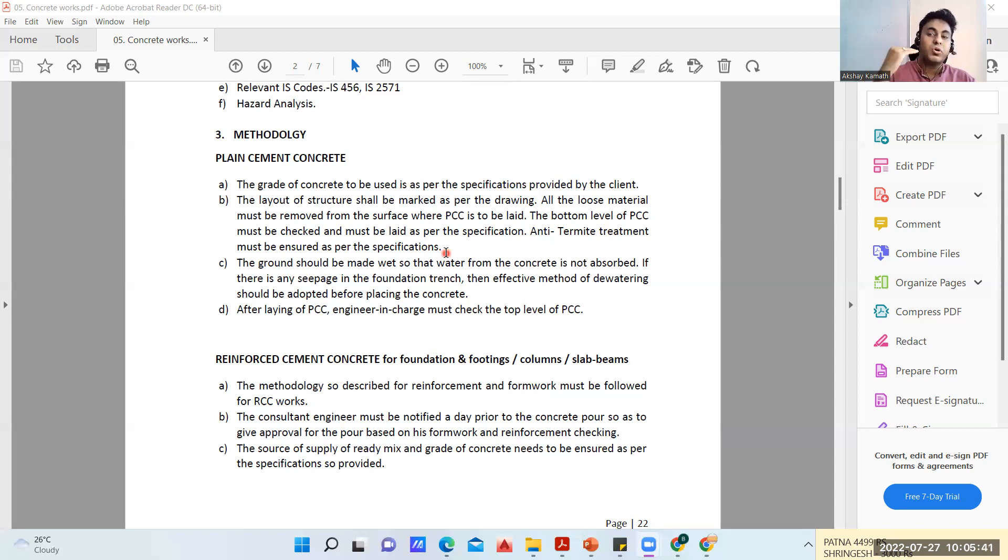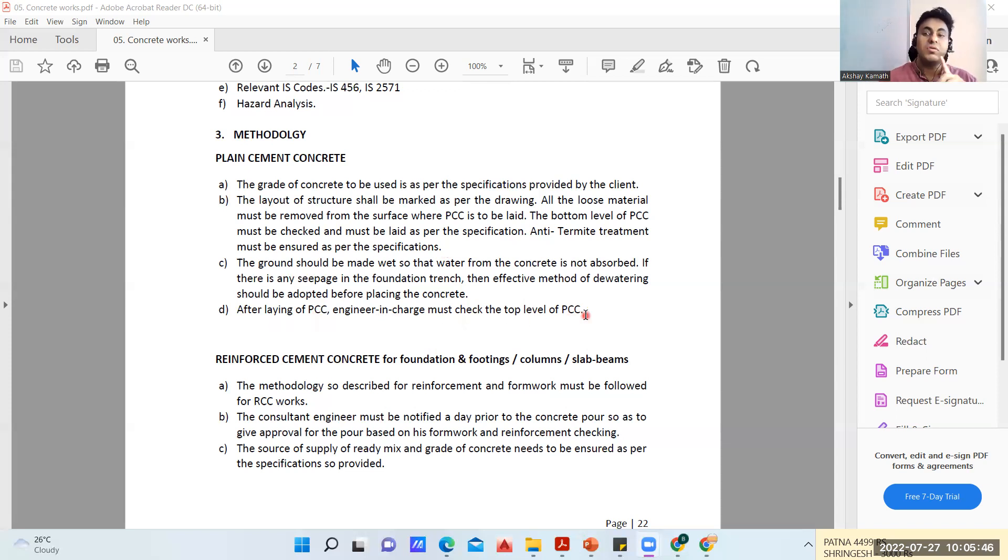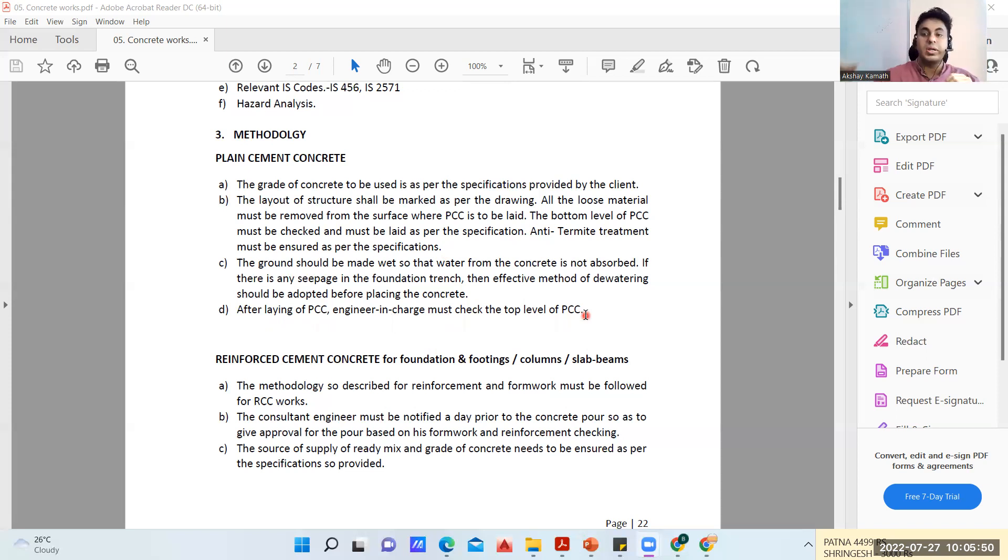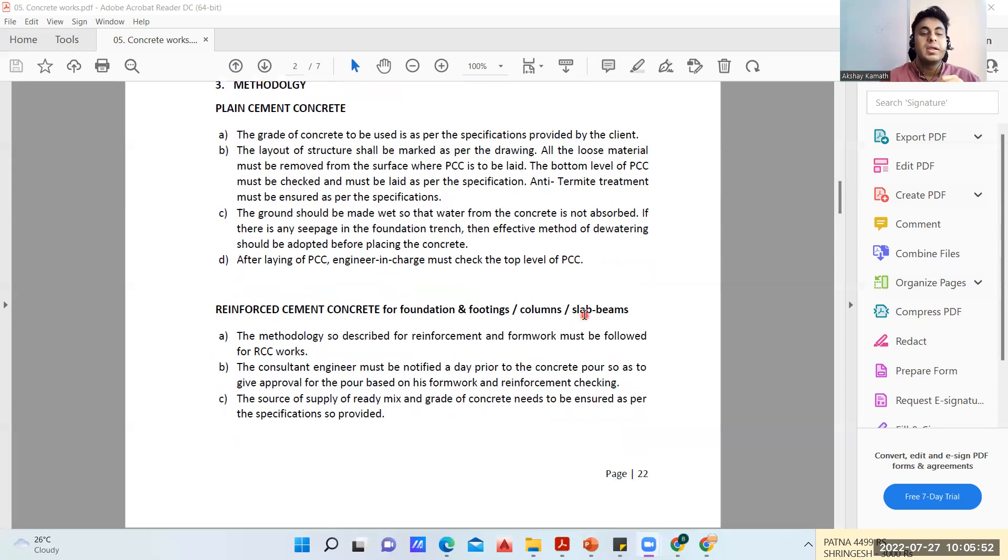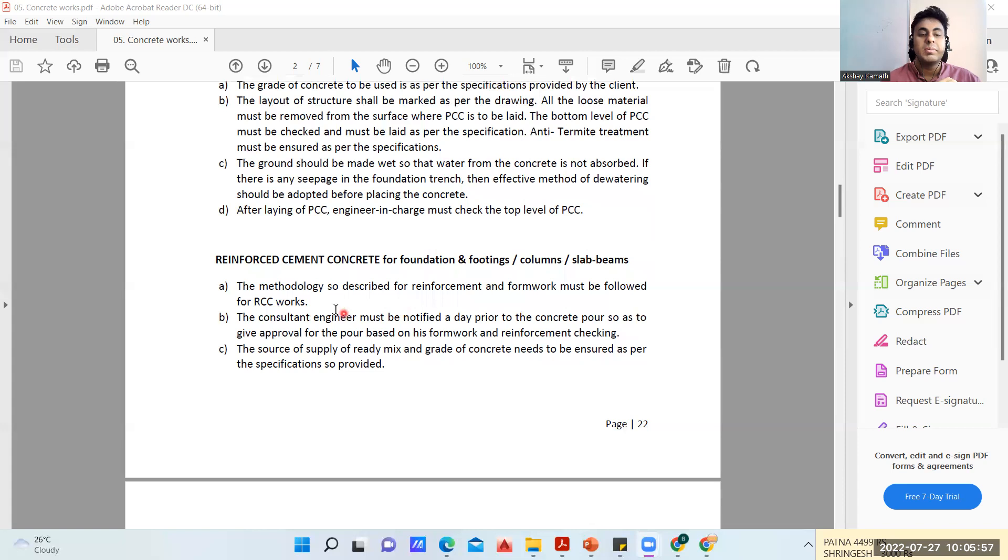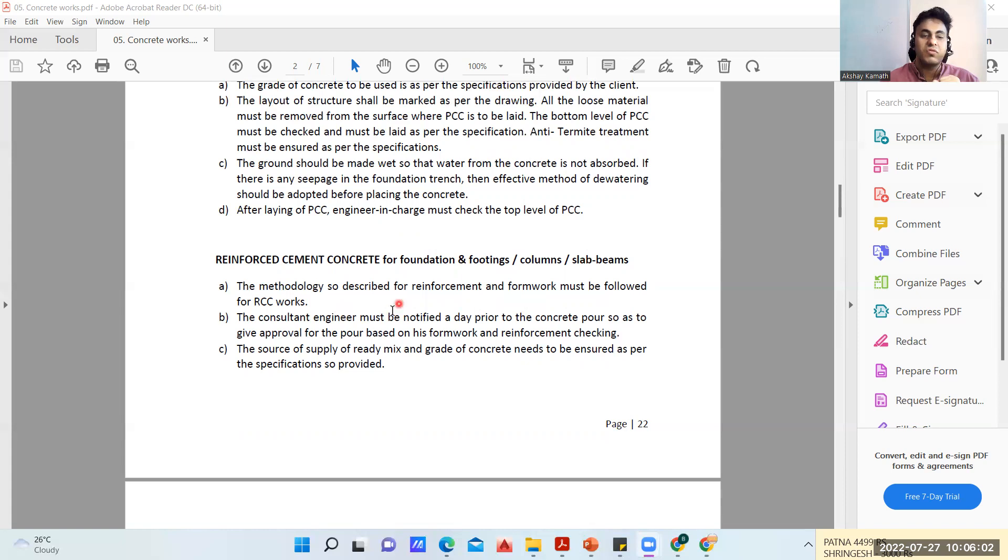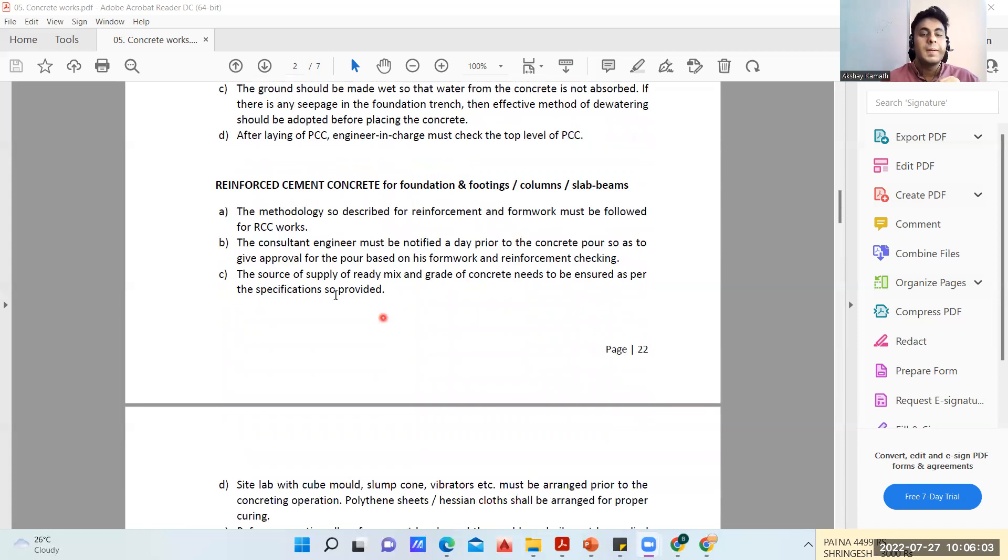After laying of PCC, the engineer in charge must check the top level of PCC. If it is 75mm, you keep auto level, you take a benchmark and see your reading. Next, coming to reinforced cement concrete for foundation, footing, column, slab and beam - the methodology is described here.